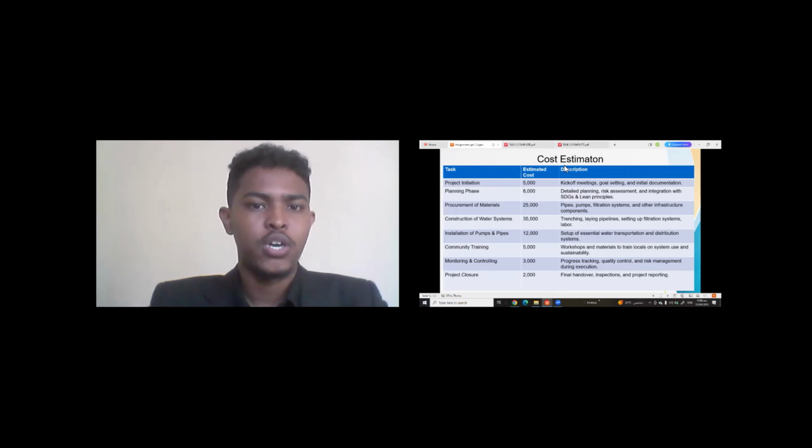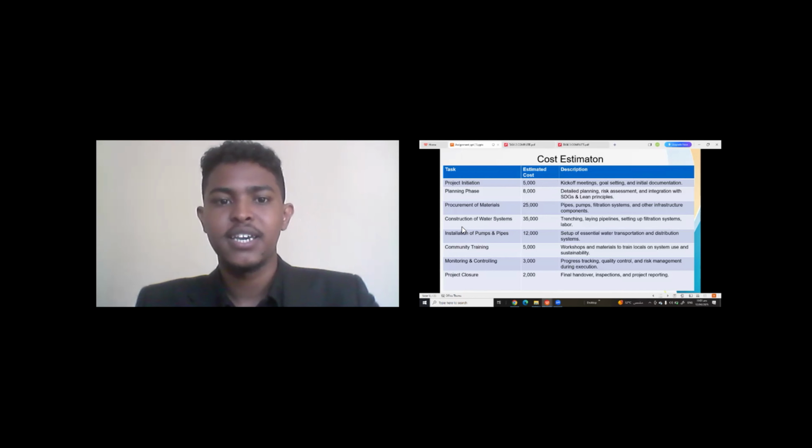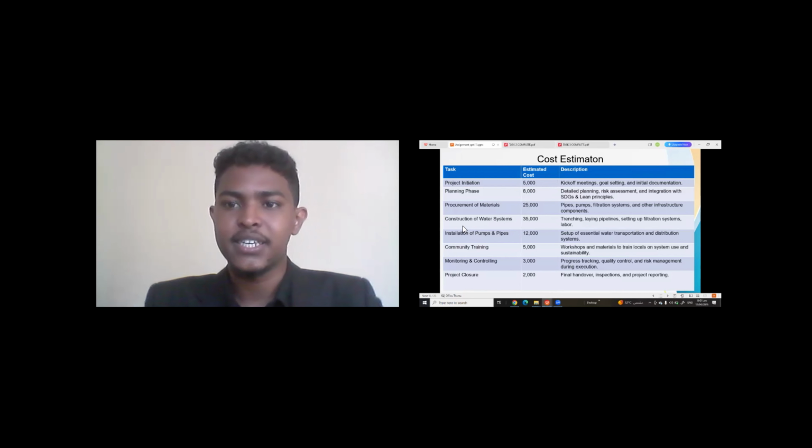If you go through this section, the construction of the water system has incurred the highest estimated cost, which is 35,000. This phase involves laying pipelines, setting up filtration systems, and labor.